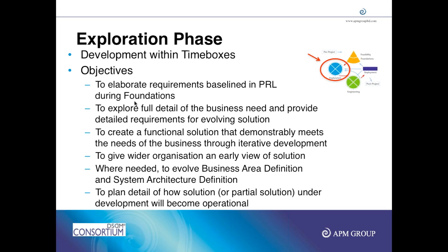And on the last day, that is on the 10th day, we look at what work has been done, do a demo to the customer or the business ambassador, get the feedback, and then also do retrospection. If any of the requirements of the time box have not been completed, it doesn't mean that we extend the time box. It doesn't get extended by even one day.